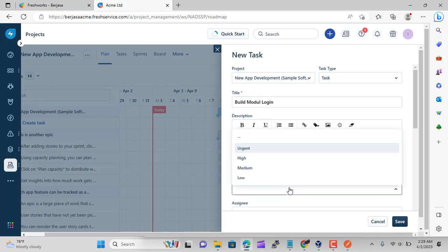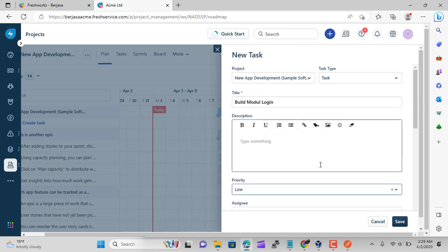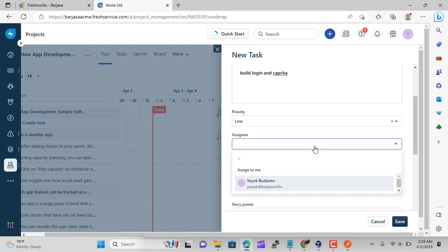Planned work. Any piece of work that has values for the planned start date, planned end date, and planned effort fields is considered to be planned. Unplanned work. Any work that has not been planned completely is considered to be unplanned. Delayed work. Any work that has status as in progress.